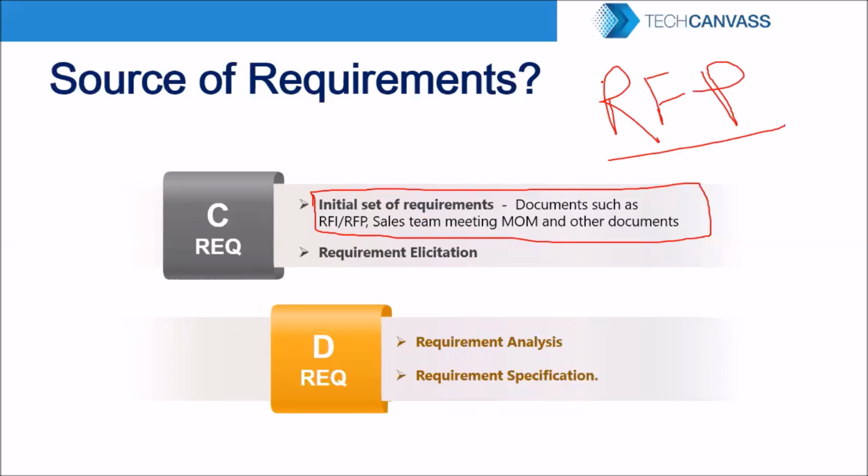So there is always a tender to which the companies apply, saying, okay, I want to do this project and this is what I will charge. Similarly, in software the same thing happens. Companies issue an RFP or a tender. Different companies respond to it, saying, okay, we want to do it. Then further discussions and negotiations happen, and based on the criteria the company has set up, one vendor is selected and told, okay, you go ahead and do it.